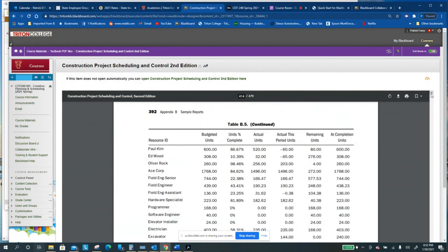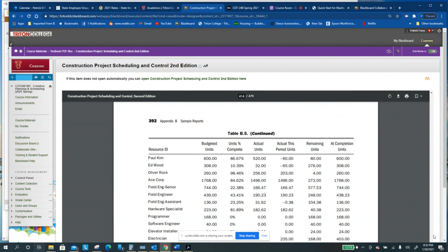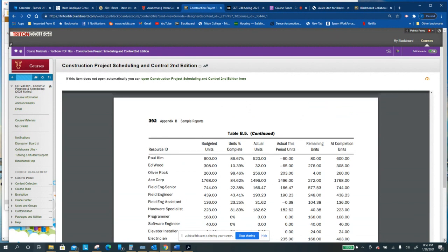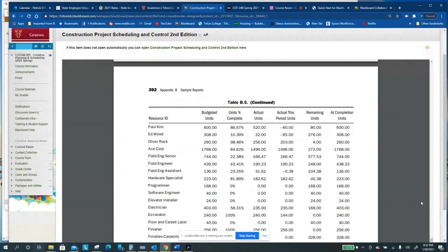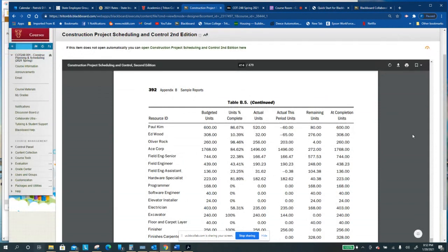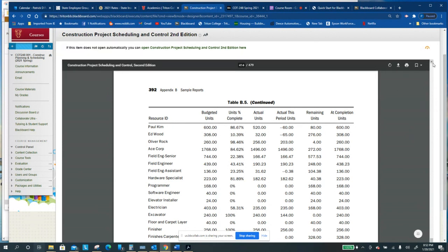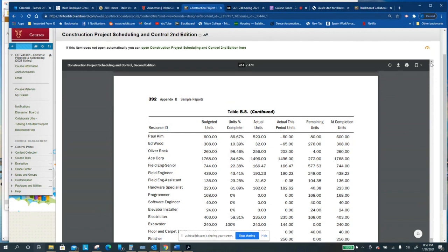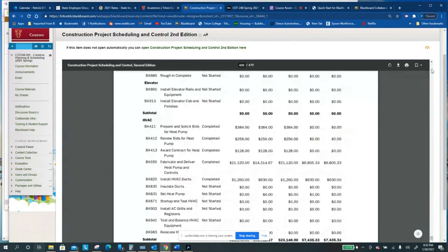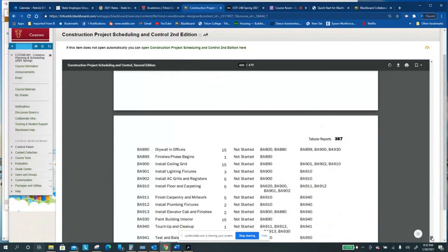Somebody who doesn't track their own work progress and effectiveness, their labor rates, their output, it's real hard to price jobs, and all that information is kind of lost if you're hiding it because you don't want anyone to blame you for being late in this project. That's not the point of a schedule. A schedule is a living document. It is to plan, but it's also control. It's a control point, and it's very valuable.